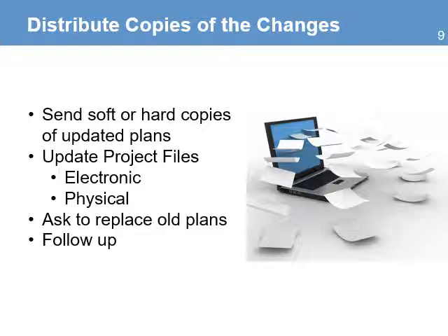Why? Because if they don't do that, they can sometimes get confused and pick up the old plans and start working on those instructions. And that could be another serious problem. So it's important that you do some follow-up, especially with the team and the people who will be using the plans and instructions to do their work, to ensure they are using the latest versions of the plans with the latest approved changes.